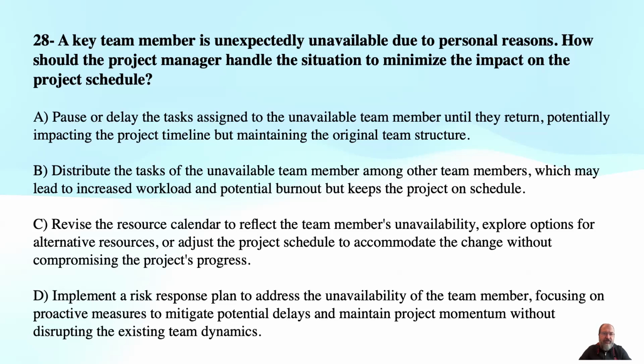Option B is incorrect because distributing the tasks of the unavailable team member among other team members may increase their workload and potential burnout, which is not an effective or sustainable solution to minimize the impact on the project schedule.